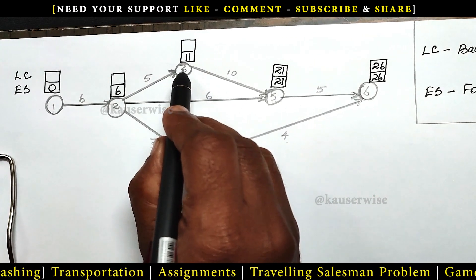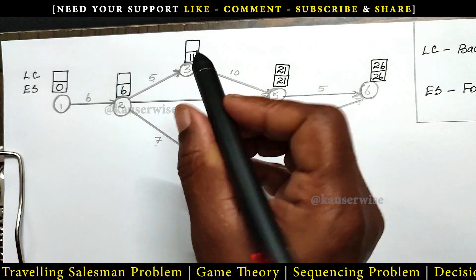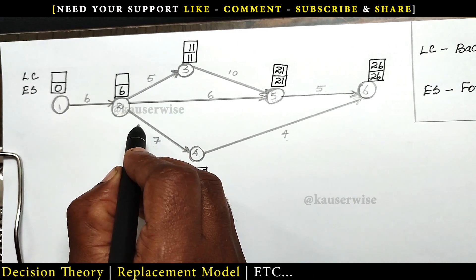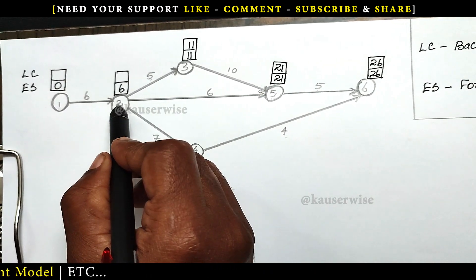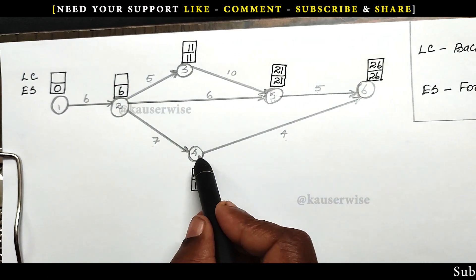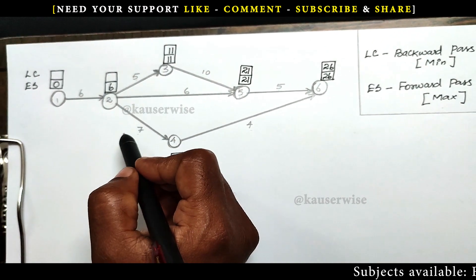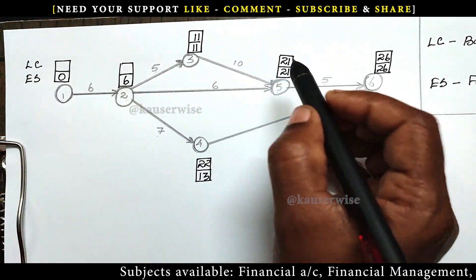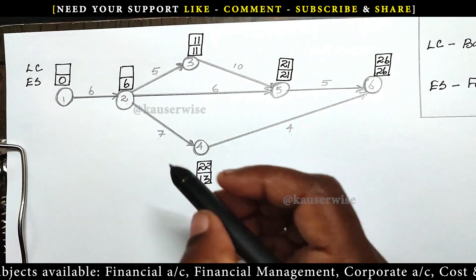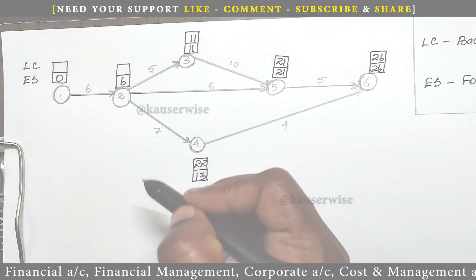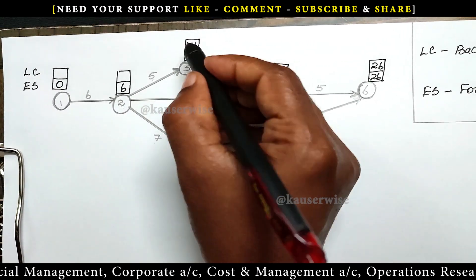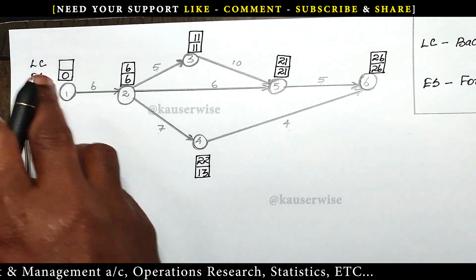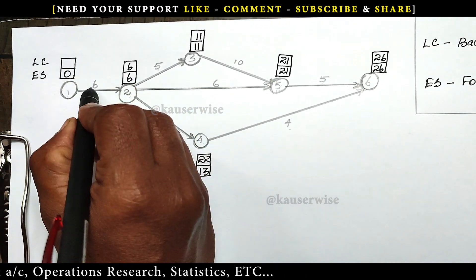The next one, node 3: 21 minus 10 equals 11. The next one, node 2 — here we have three options. The first option is path via node 3: 11 minus 5 equals 6. The second option via node 5: 21 minus 6 equals 15. The third option via node 4: 22 minus 7 equals 15. We need to select the minimum duration — the minimum is 6. So 11 minus 5 equals 6. We select minimum duration for backward pass, that is for latest completion time. The last one: 6 minus 6 equals 0. This is the way to calculate earliest start and latest completion time.